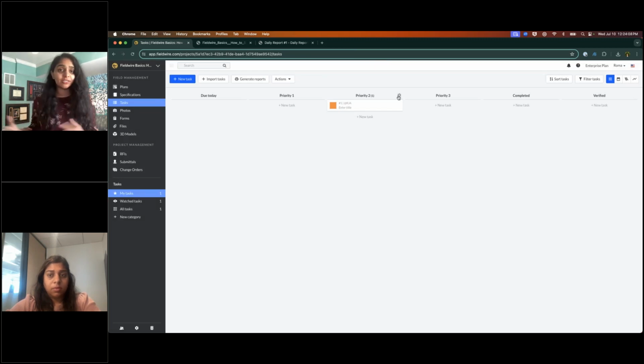So for general contractors, let's say you're using Fieldwire for punching, it could be as simple as complete, in progress, on hold, and you would move the tasks throughout the columns. For your subcontractors, you have a lot more room to play with. So an electrical subcontractor could make it like terminated, rough in, wire pulled, etc. And that way you can see what fixtures are in which status.